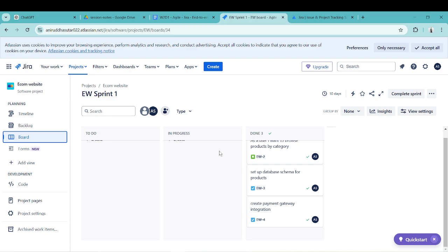There are some approaches of software development lifecycle. One approach is that the entire project should be broken down into time frames. Then each time frame takes some features, then you fully develop and test everything, give the demo to the product owner, and if the product owner is okay, then deploy it to production.